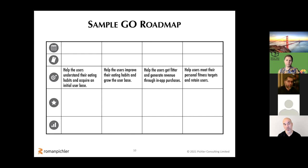So these goals, they should really communicate how the product is likely to evolve, but evolve in a meaningful way. So order them accordingly. And the way I've done it here is by considering essentially their semantic dependencies, what has to happen first, what could happen next, what could happen third, and so forth. And then I've chosen some timeframes here, in this case, quarters. Then I've chosen some names, as meeting those goals should result in new product versions. And you can see the first version will be the MVP, the minimum viable product.